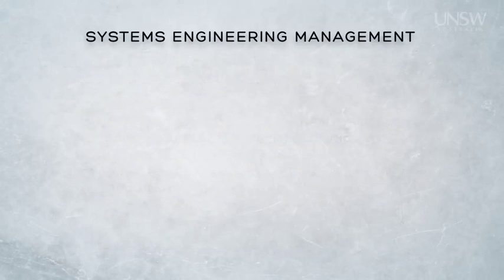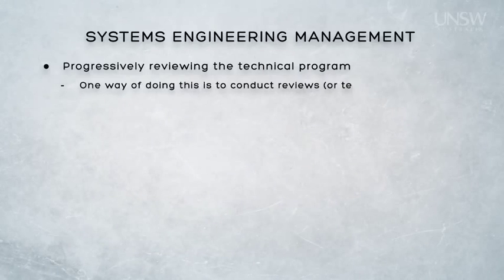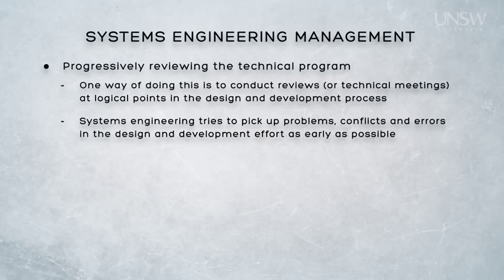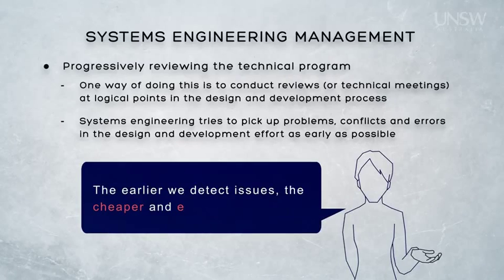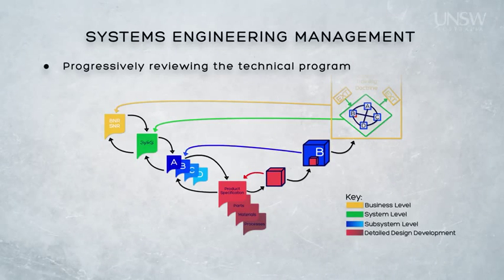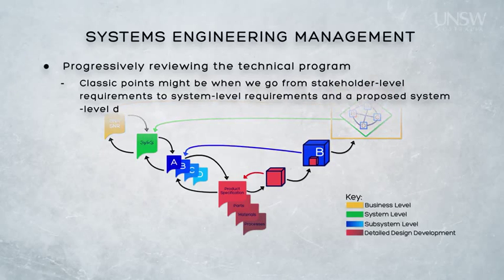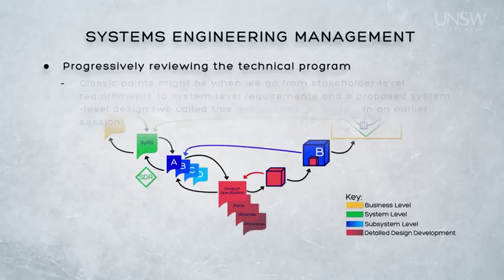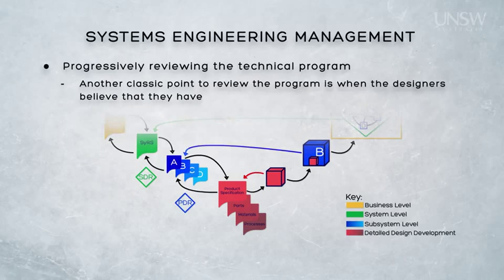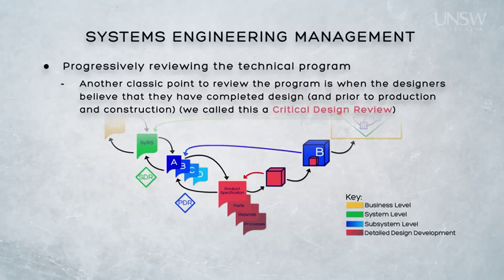Throughout this course we have discussed the idea of periodically reviewing our work at logical points in the design and development process. This is an effective way of detecting errors, conflicts and problems with our design as early as possible. After all, we know that the earlier we detect issues, the easier and cheaper they are to rectify. In this course, we are suggesting reviewing things after major transitions. For example, we spoke of a system level review called the system design review when we transitioned from stakeholder to system level requirements. We suggested a subsystem level review called the preliminary design review, and we also suggested a detailed design review called the critical design review when the designers believed that they had completed the detailed design of the system.